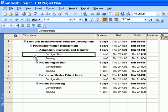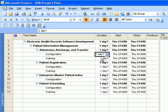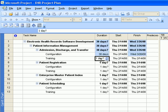The next thing we'll do is enter the duration for the tasks. Let's start with Admission Discharge and Transfer, which has two parts: configuration and training. According to the exercise, the configuration segment will take 30 days, so enter 30 days, and the training will take 5 days.